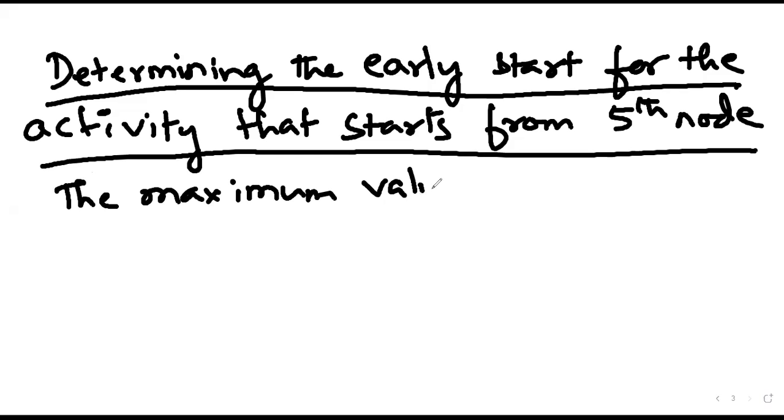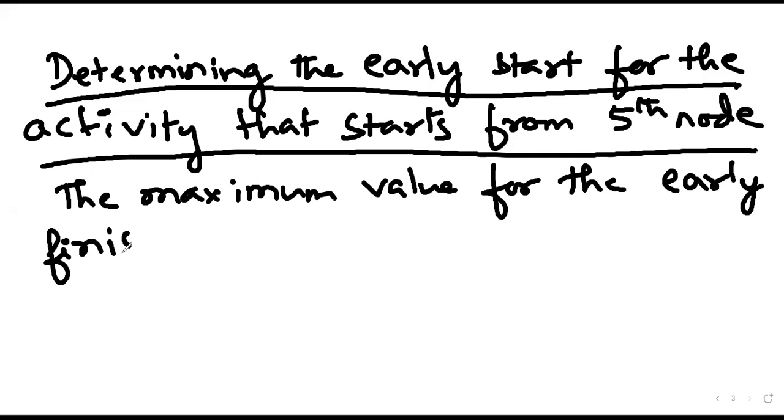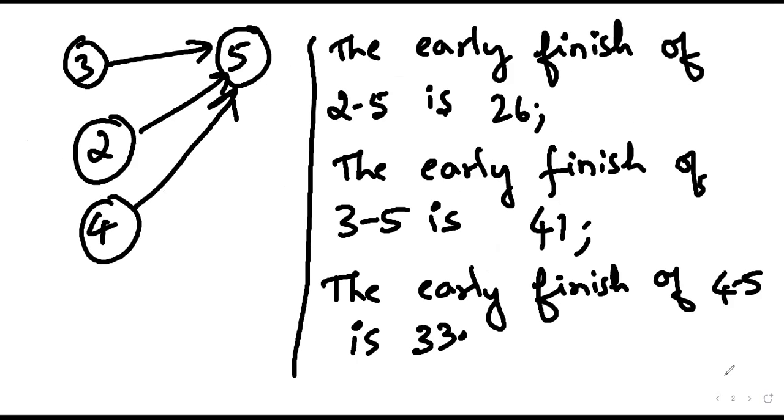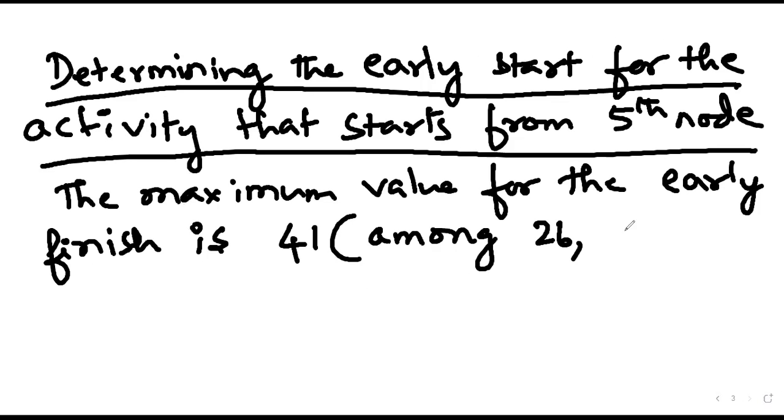The maximum value of the early finish among the 3 values, that is 26, 41, and 33, is 41.